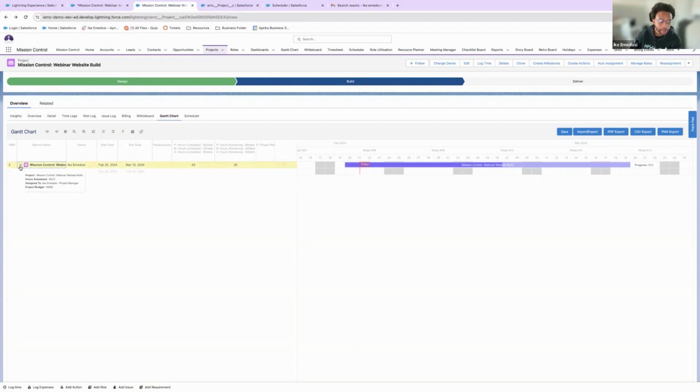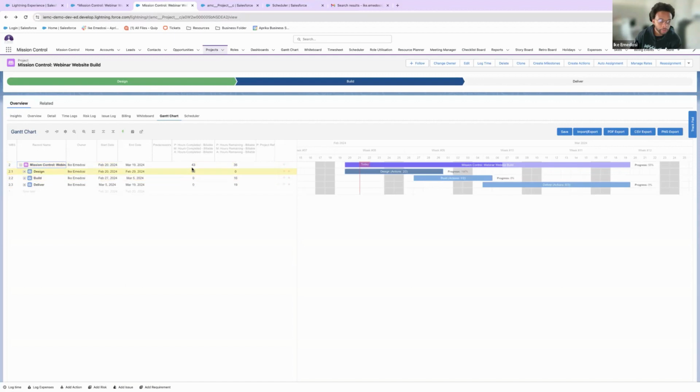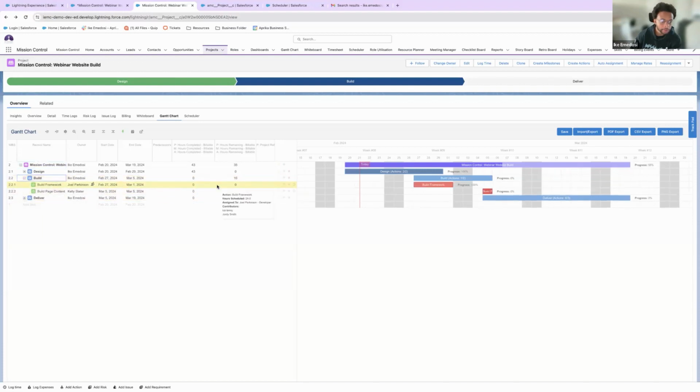So we can see there's 43 hours completed in the project. And we can see that that first milestone has been all the way complete, nothing remaining. But we can see that the last 2 milestones have 0, 0 completed, and 16, 19 hours remaining on each one. And if we drill down even more, it's going to show me at the action level here, which is great. From the graph here, we're able to show the progress we made on the Gantt chart through a visual, but also saying right here how much progress has been made, as well as the milestone level here.